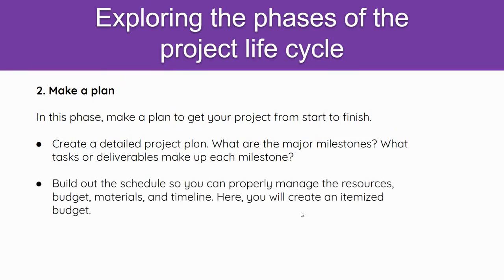At the project planning phase, we also set out or build the project schedule, which will give us a clear picture of how the project will be implemented from start to finish. This will help us manage resources. It will help us also set up the budget and materials and timeline. So our project schedule will involve what are the different activities you are carrying out, when do you want to carry out a specific activity, what are the resources required for the activity, what is the budget of that activity, and what are the materials needed for the activity. This is very critical for project success. So planning is very critical at this stage.